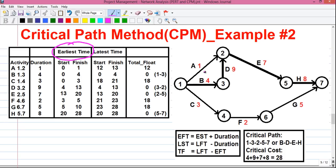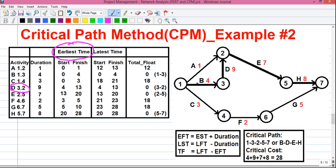Let's calculate the earliest time. We will start with activities A, B and C since they are the starting activities. Starting activities don't have any predecessor, so their EST is 0. For activities A, B and C, the EST is 0, and their EFT will be EST plus duration: 0 plus 1 equals 1, 0 plus 4 equals 4, 0 plus 3 equals 3. Next is activity D, whose predecessor activity is B. B must be finished before D can start, so the starting value is 4. The ending value is 4 plus 9 equals 13.